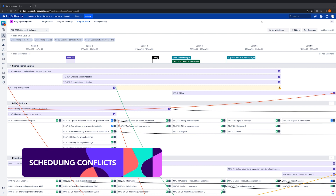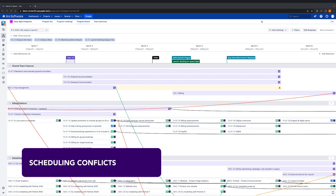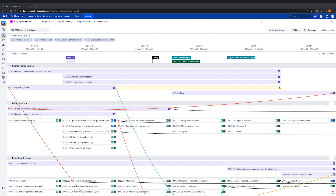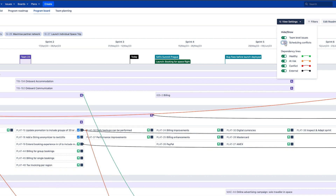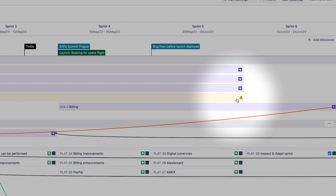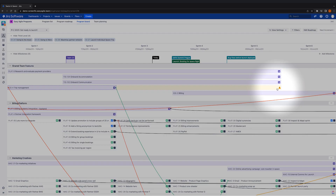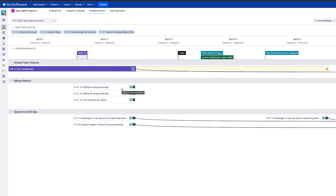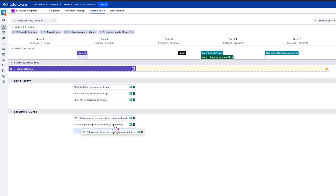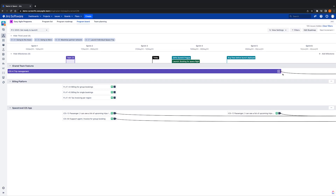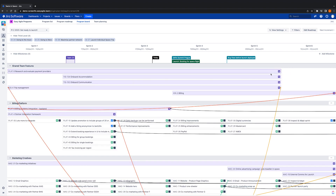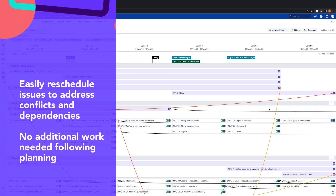While dependencies are a highly visual indicator of where we may need to make adjustments to committed work, so too is our scheduling conflicts feature, which we have the option to toggle on. If we are at the stage in our planning where teams have broken down committed features and have scheduled their issues into sprint columns, we have the option to turn these on so they are visible on the program board. This warning sign means we have an issue that is scheduled outside of the time period for its parent feature or epic. To isolate the issue or issues in question, we can simply click on the feature to filter the board. To address this, we have two options we can action directly from the program board: we can either reschedule the issue into a different sprint column through drag and drop, or reschedule the start or end date of the feature by dragging the edge. These are JIRA issues and the teams are agile boards in JIRA, so we can easily reschedule our issues to address conflicts or dependencies during but also beyond planning.